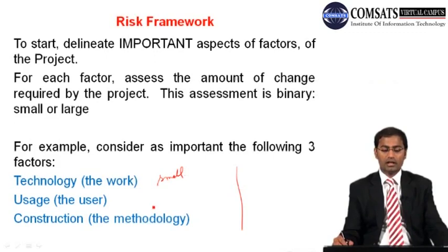and usage, the user, how predictable your user is, so that is kind of unpredictable, so you are using large. And construction or the methodology, so that is very much apprehended, so that is small. So that project, 2 smalls, 1 large, so that is 2 and 1 out of 3.